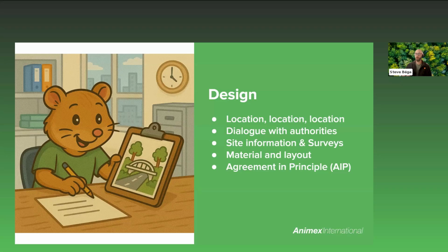The timeline for this kind of design stage can vary, depending on delays. Typically, if you're waiting for data needed for the design, there can be a bit of a delay. This may include topographical information, habitat mapping, and underground services. Data all has an impact and is all required to conduct that detailed design. So the earlier you begin to engage all stakeholders and gatekeepers of this data and information, the smoother this process will be.